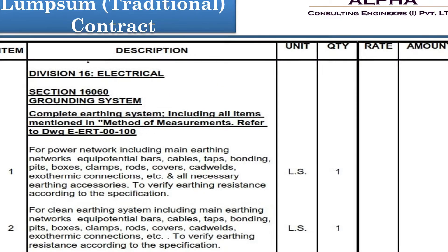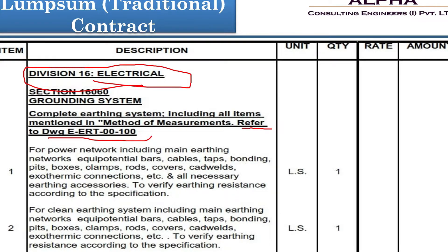Here is a sample of a lump sum contract BOQ where electrical work is shown. It clearly references the drawing to be used for execution. Item number 1 covers power network work — cables and bondings — with the unit given as lump sum and a quantity of 1. In a lump sum contract, the unit is given as LS and a fixed rate is quoted by the vendor. This is a typical example of how a lump sum contract BOQ is prepared in a project.